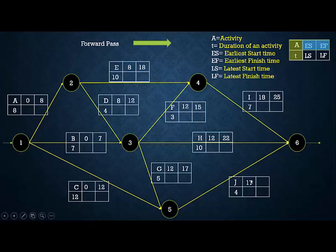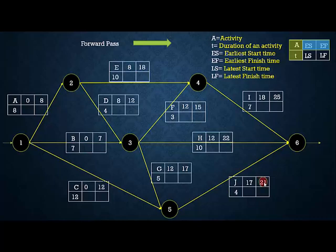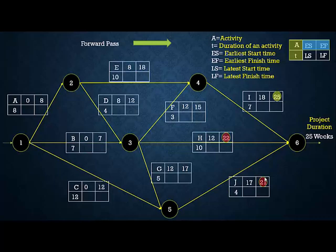Activity J has two preceding activities: C and G, with EF values of 12 and 17. Taking the maximum, ES of J = 17, and EF = 17 + 4 = 21. The forward pass is now complete. The three tail activities are J (EF = 21), H (EF = 22), and I (EF = 25). We take the maximum EF, which is 25, so the total project duration is 25 weeks.